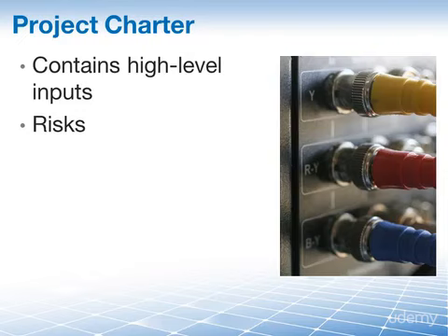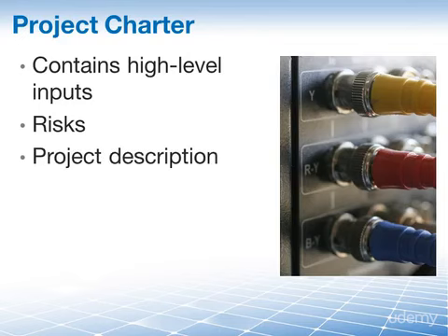We have already identified risks as we created the project charter, so we should use them as we are planning our risk management approaches. Then we have a project description. This will help us determine the importance of the project to the organization and thus the appropriate degree and visibility that we need to give to our risk management approach. We have the requirements in there. This can shed light on how much risk is inherent in our project. Many complex requirements means a lot of risk. Fewer, simpler requirements means lower risk.